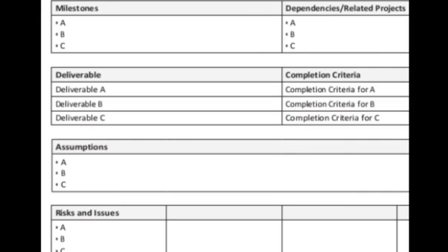Now, in carrying out all of this, in giving all of these milestones and promising all these deliverables, you are doing all this under certain assumptions. Understand? For instance, you have said your milestone A is to deliver the foundation of the house, and it's going to take 7 days. One of the things you are assuming there is that there's going to be fair weather. In that 7 days, you are expecting rain not to fall. Let's take for instance, in that 7 days there was a heavy downpour and rain fell consistently for 3 straight days and you couldn't work. It means 3 days of that 7-day milestone are already gone. So you are promising that 7 days with the assumption that the weather will be fair and allow you to carry out your work.